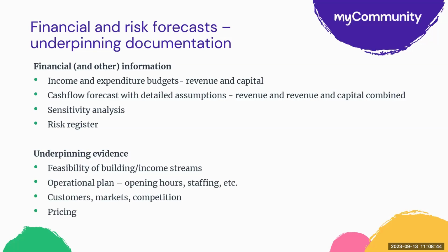You'll also need to put together a risk register, which you're expected to keep updating throughout the project, and actually should be updating for yourselves forever. The underpinning evidence that goes into that is really any feasibility you've done about the building or research on the income streams. You will need to think about an operational plan for the building, particularly if you haven't already been operating that building. When will it be open? What staffing will you need?